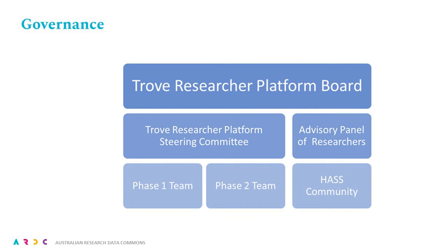There will be two teams: the first to progress phase one of the project, consulting with the research community, and the second will implement the requirements identified in phase one, developing the functionality behind the Trove Researcher Portal. In addition, the Trove Strategic Advisory Committee and the Trove Partners will be kept informed on the project. The membership of the three key committees will include broad participation from the lead institutions as well as the wider research community.